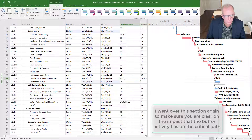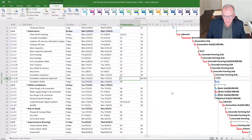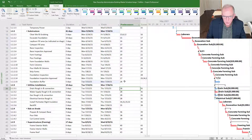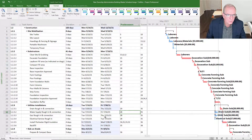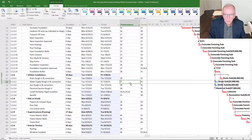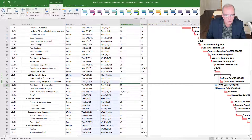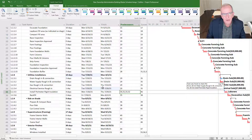To recap: I've inserted the Foundation Buffer row, linked it to row 28, and now I link the successor activities to row 29. When I put in 29, it has basically changed my whole project schedule — pushed it out. It will do that for activities on the critical path, but not for those that aren't. This was originally on the critical path, so it's having the most impact. In essence you're adding five days to your project — giving yourself that extra buffer.